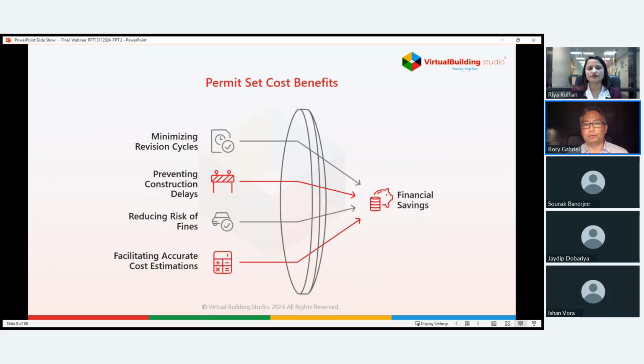In Washington State, for example, an average permit delay of about 6.5 months creates holding costs. Things like financing, property taxes, insurance, things that the owner or developer pay monthly. They result in over $31,000 of extra costs. All that just because the project couldn't get started on time.